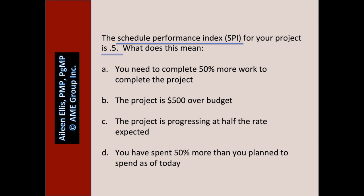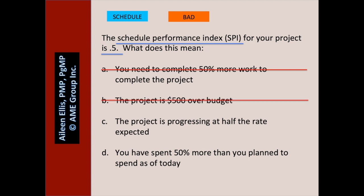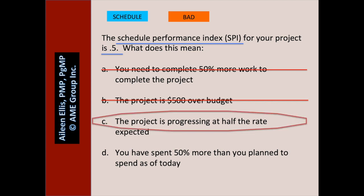The schedule performance index for your project is 0.5. What does this mean? Pause the video and answer the question. Is this about schedule or cost? It's about schedule. 0.5 — is that good or bad? That's bad. A: you need to complete 50% more work to complete the project — we have no idea; schedule performance index doesn't tell us about what we need to complete the project. B: the project is $500 over budget — we have no idea. C: the project is progressing at half the rate expected — this is the answer; with SPI of 0.5, we're moving at half the rate expected. D: you have spent 50% more than you planned to spend as of today — D relates to cost.